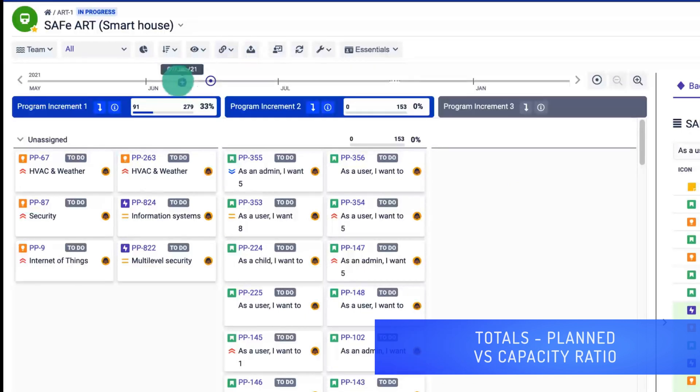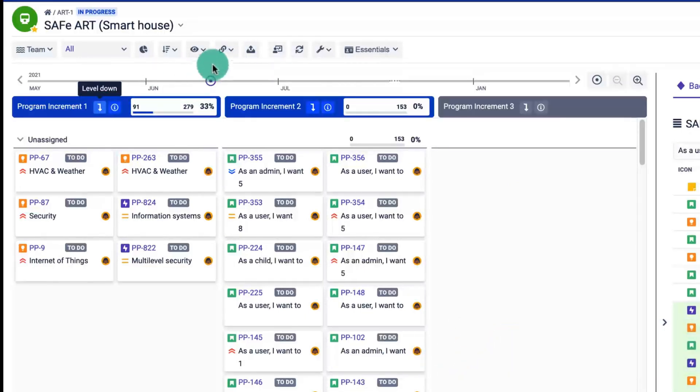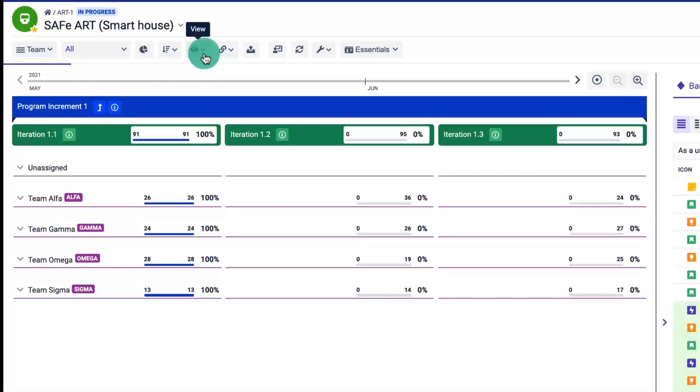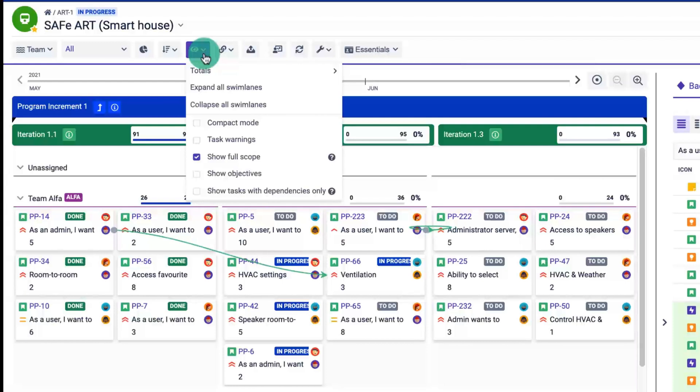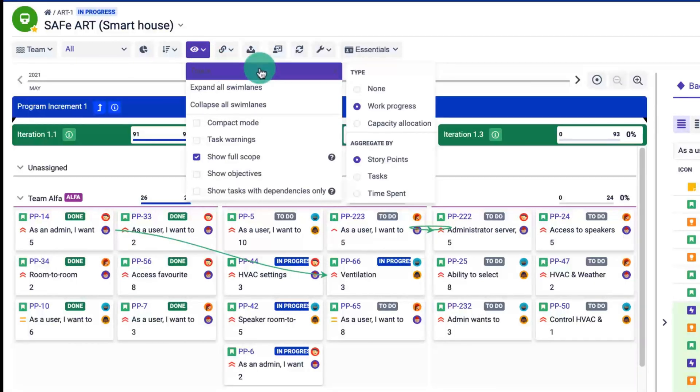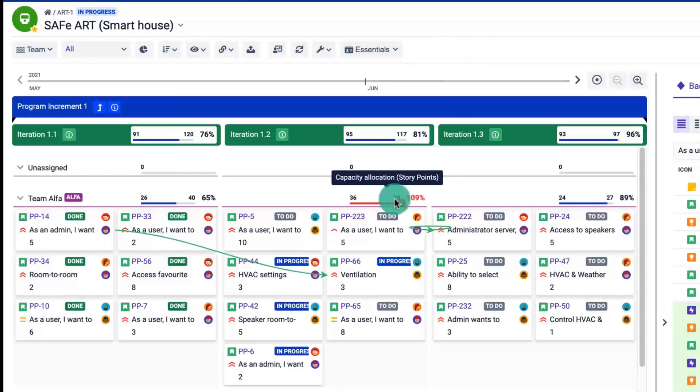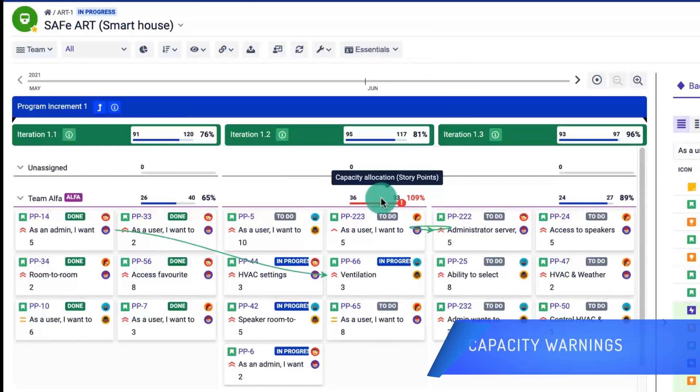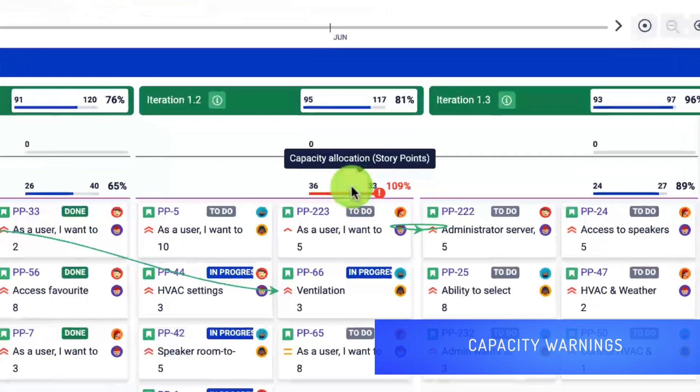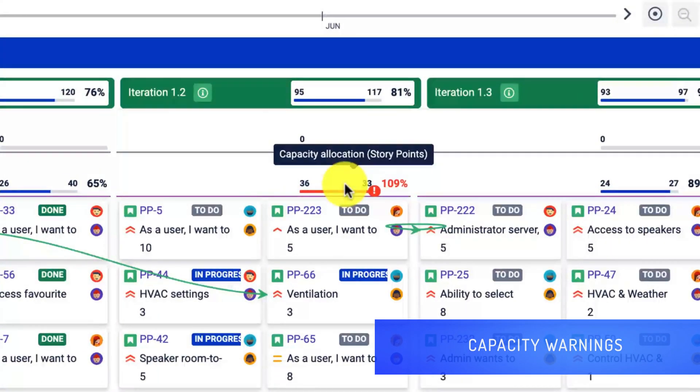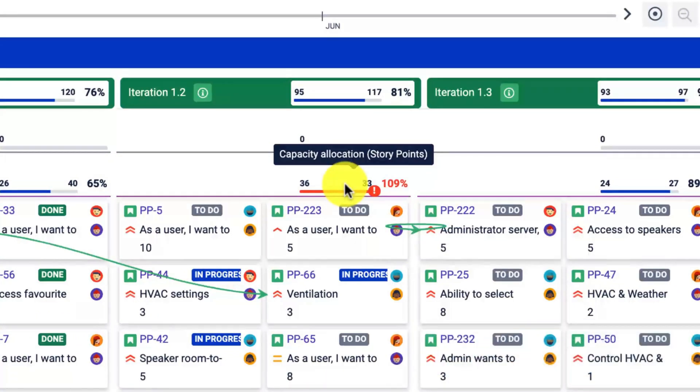To display the capacity, click the view drop-down and select totals capacity. The planned versus capacity ratio is now displayed for each time box for each team. Warning will appear when the capacity is exceeded so that you can easily spot the team which needs your attention.